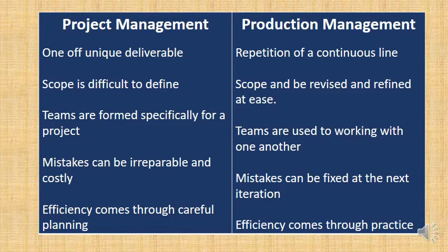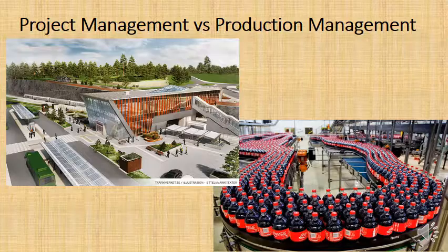And as I said, on a typical civil engineering project, if it's a 10-year project, that could be 7 years of planning and then 3 years of design work and construction. That would be fairly typical for a lot of civil engineering projects.